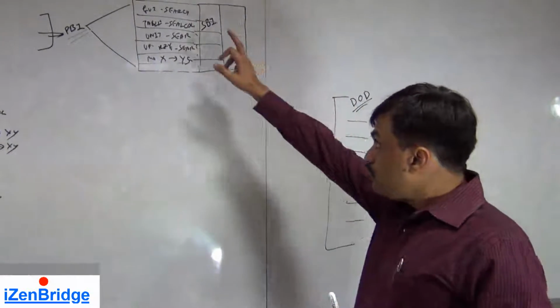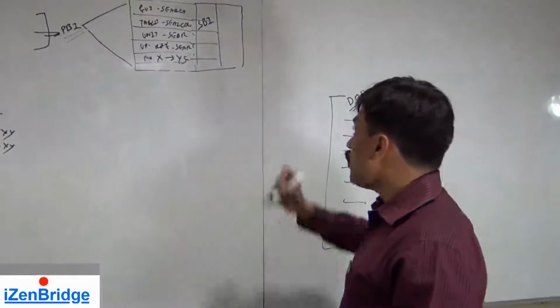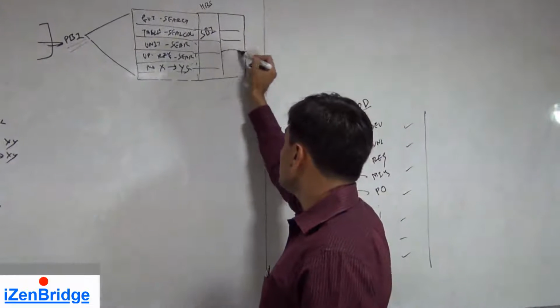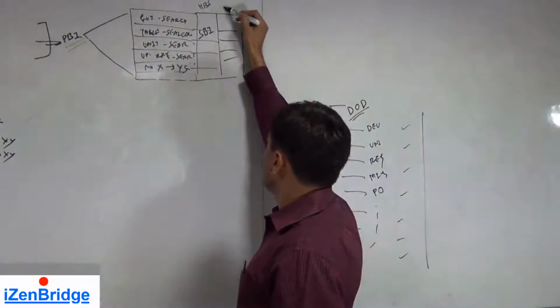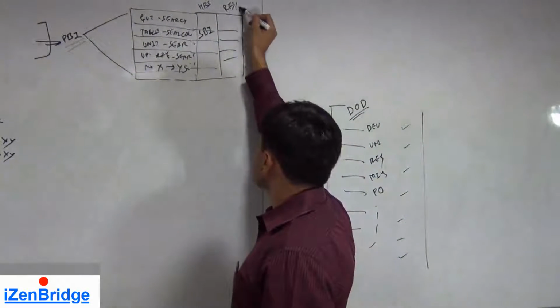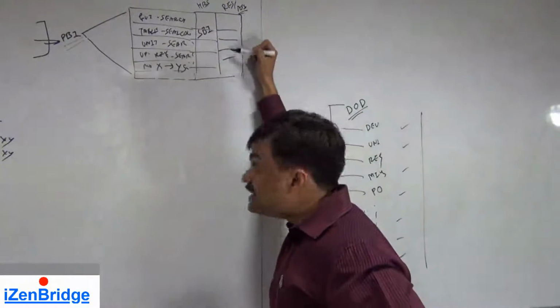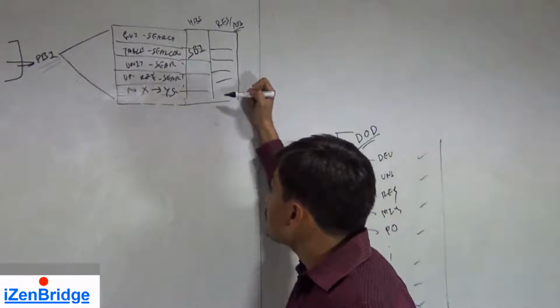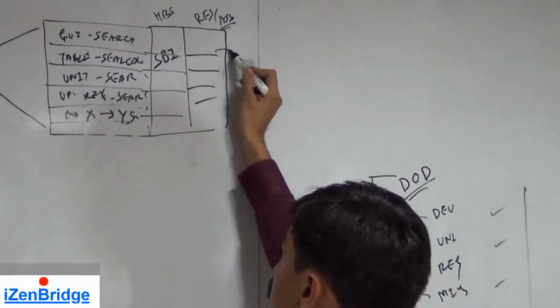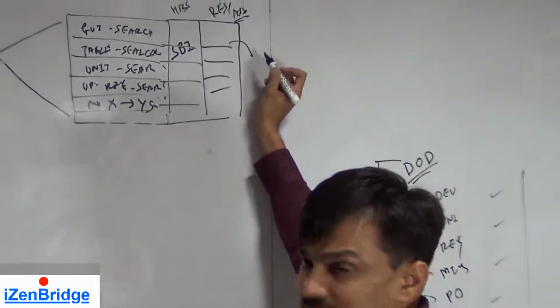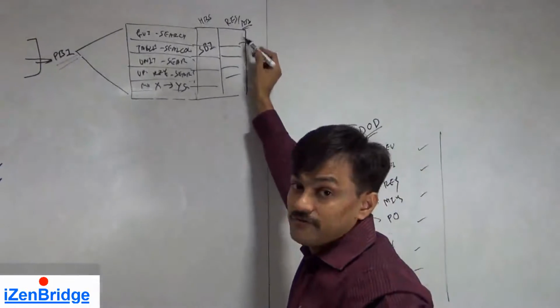Now, along with ideal hours, we also put a person who is working on it, a responsible or assigned person. This is not necessarily assigned for the complete sprint backlog, but the sprint backlog items which have to be executed soon in upcoming days may have a person identified here.